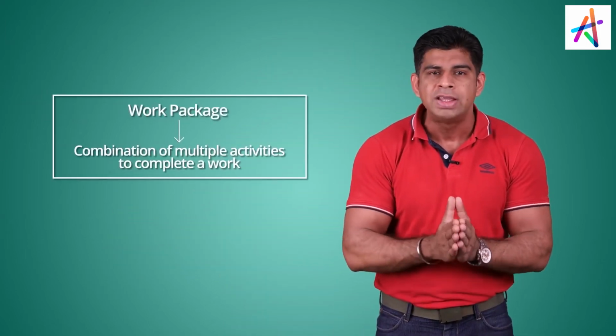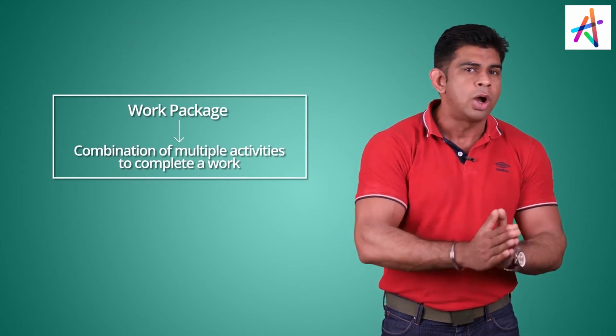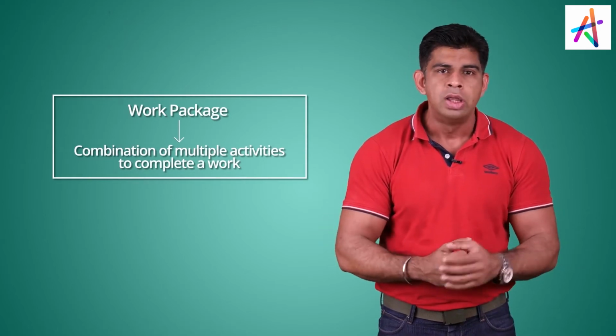If you are not very clear about work package as such, we are going to cover that in detail during the course, right? So you'll have a complete understanding about what the work package is all about. But once the work package is created, which is a combination of multiple activities to complete a work, the lowest level of work, which can be done in minimum 8 hours, maximum 80 hours, you would have activities.